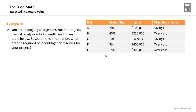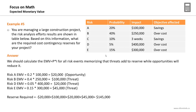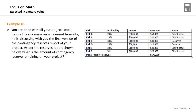A threat adds to the reserve while an opportunity reduces it. Calculate the EMV of each cost-affecting risk, assigning a positive sign for threats and negative for opportunities. Risks A, B, D, and E impact the budget. With three threats and one opportunity, the total reserve required for the project is $145,000 USD.